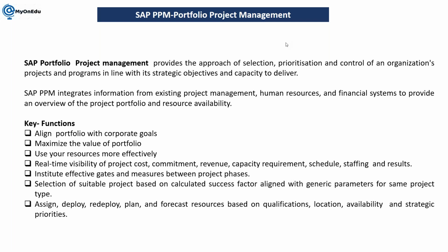The resource manager checks the free pool or resource pool for the best resources available as per qualification and availability, and proposes them. Then the request comes back to the project manager, who negotiates with the candidate and finalizes it, so the project manager accepts it. Similar scenarios we have here in project management, in a very detailed format.